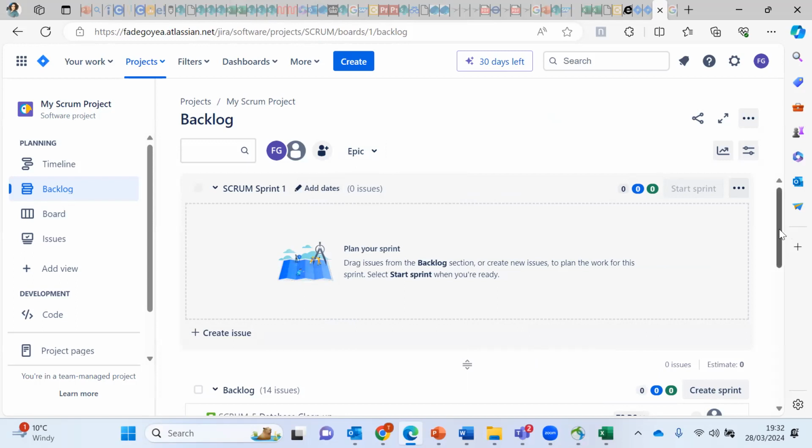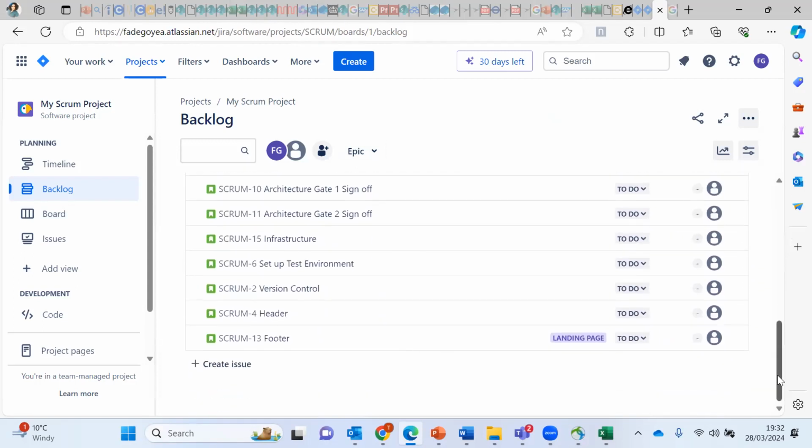Okay, all right, cool. So what we want to do now is in Jira. I know in Azure DevOps we call it epic, we call it features, then we have our user stories, then we have our tasks, and we have our bugs. In Jira, we call all these things issues. So either it's an epic, so we still call it epic, but Jira recognizes it as an issue, right? The stories, which we call the stories issues, the bugs issues, the task issues.